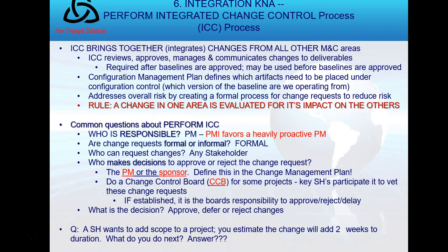In fact, that's an interesting point, that risk is reduced when we implement the approved changes, and only the approved changes. We never implement changes that aren't approved, changes to our project management plan. Okay? So ICC is integrating these, bringing them together.